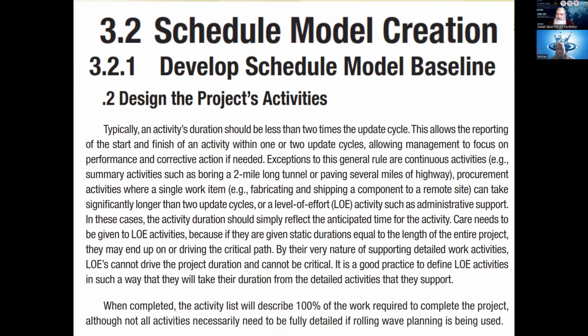Say that this activity does not get completed in the second week, it gets delayed. So by the end of the second week, what would be the progress? Only the previous 50%. When the activity ends, whether in the third week or fourth week or 10th week, 100% will only be given at that point in time. Till that point, it will go on with 50% progress. You understand that point?